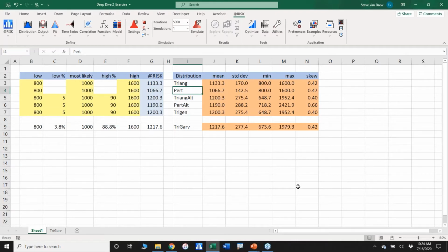If all you've done is either live or by email somehow asked for the 3-point estimates and haven't been specific enough about what you meant by low and high, min and max even, optimistic, pessimistic, best case, worst case, then when you're done and ready to go to work, you come back to your office or cube and you sit down to model it and you go, wait a minute, I asked for a low here, but did their answer really mean it'll never be lower than that?